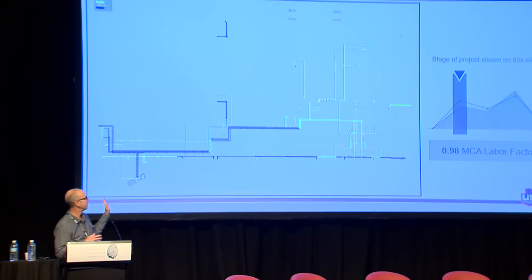I've also found in this case, this is very objective data. There's no subjectivity to it. It has a tendency to be a little bit unforgiving in that work that's partially complete you don't get a lot of credit for. Okay, so that's one negative to it. However, it takes the subjectivity out of it, and now what I can do is gather the data. If you think about doing profit forecasts this way on your jobs, I don't actually have to have the most experienced guy out there looking at things trying to figure out how complete I am, right? I could actually have a project engineer just figuring out the status of the model. It isn't a high-level person doing it once the technology is in place.